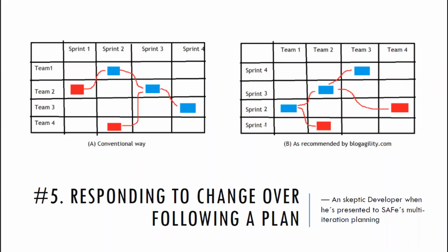Yes, and thank you for that, Sadiq. In fact, before entering into the PI planning meeting, you need to identify what the structure of your train will be, and what teams need to compose it. One of the key takeaways that M. Campbell defines is that you need to focus on the value stream that you are supporting with this train. And there is a long conversation in the SPC training about identifying your operational value streams and then identifying the development value streams, because behind these development value streams there are people. And these people need to collaborate and be together in order to reduce the number of dependencies and deliver a product.